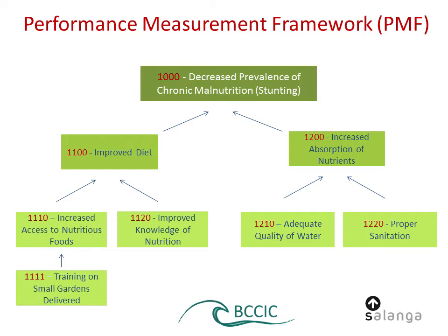Now this is also very specific to the Canadian government. Each donor defines these levels with different terms, but in most cases they mean the same or a similar thing. So we have activities, and for the Canadian government they basically flip into the outputs, which are completed activities. Then we go to the higher level. For the completed activities, it is expected that you will fully cover them, 100% achieved. The completed activities link directly to the immediate outcomes.